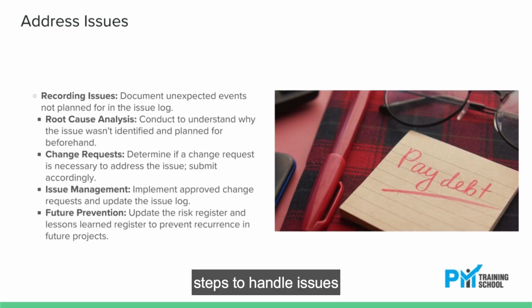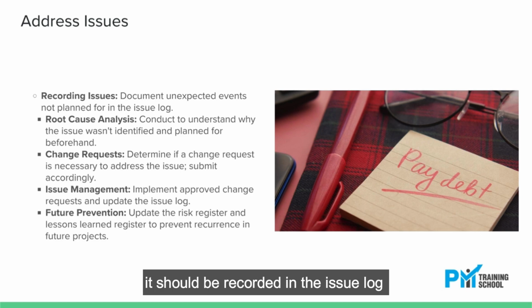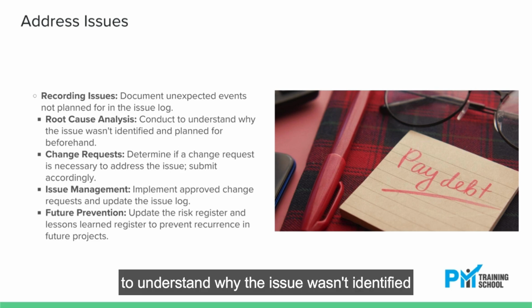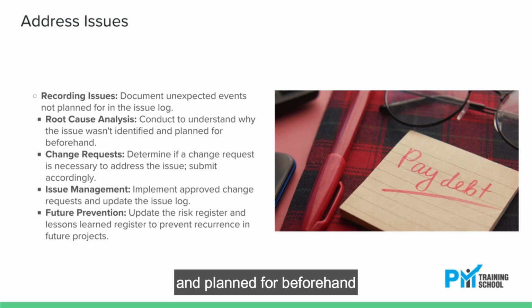Steps to handle issues. 1. Something unexpected has happened that was not planned. It should be recorded in the issue log. 2. Conduct a root cause analysis to understand why the issue wasn't identified and planned for beforehand.